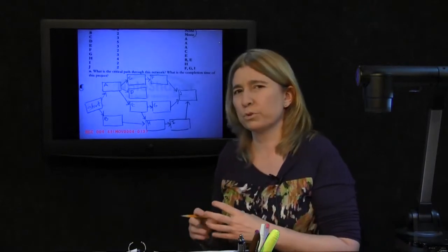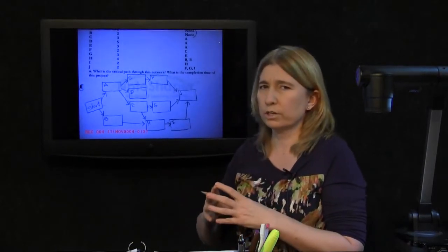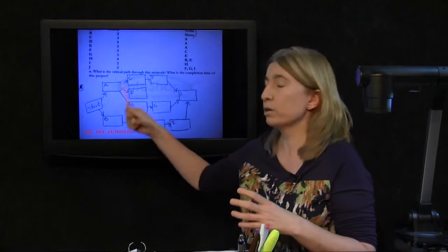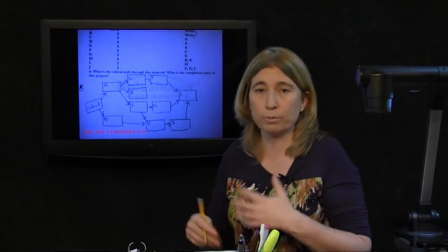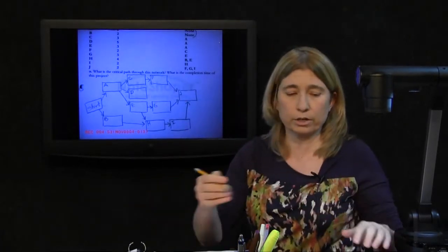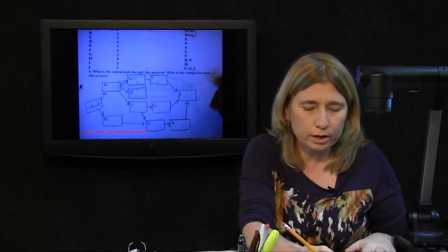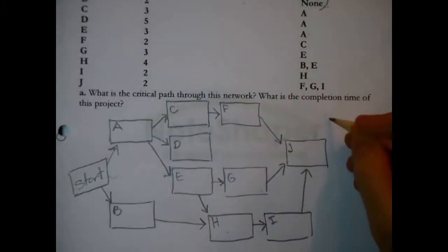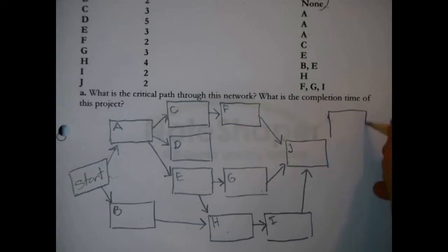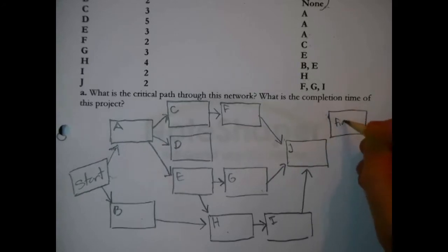Now, at this point, with this sketch, I have a representation of each of the tasks. I'm not finished with the network though, because a good project network, a good CPM network, will have one start and one finish, representing this is it, this is the end of the project. So I need to draw that, right? Oh, so I pick a point over here and I say, okay, this is the finish.